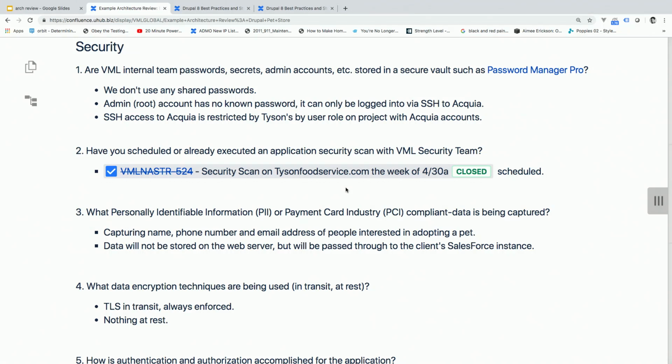So the other thing is this thing is a living outline too. It gets updated after every one of our architecture reviews. We say, we didn't ask that question. Why is that question on the form? And we will go update the form so that next time that question is there. So we update this thing, and it changes all the time. This is not the latest version. I think the newest version actually asks about percentages of people that are on a project, so we don't end up with projects with like 10% of an analyst, because that happened recently. And guess what? The lead did all the analyst work.